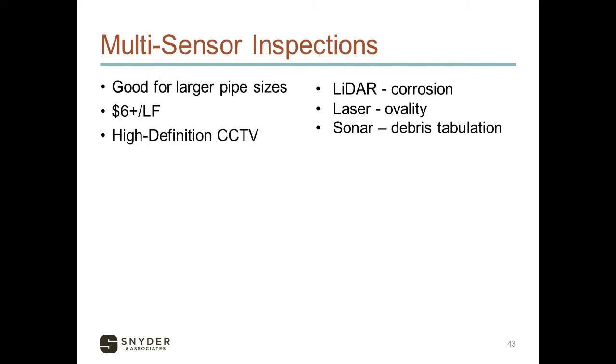So the multi-sensor inspections, we actually use this type of technology on some large diameter pipes here in the Des Moines Metro. This is really where it's the most applicable for the larger diameter sizes. For that project, this data is 5 or 6 years old, but we saw $6 per linear foot. And obviously that is probably higher now.